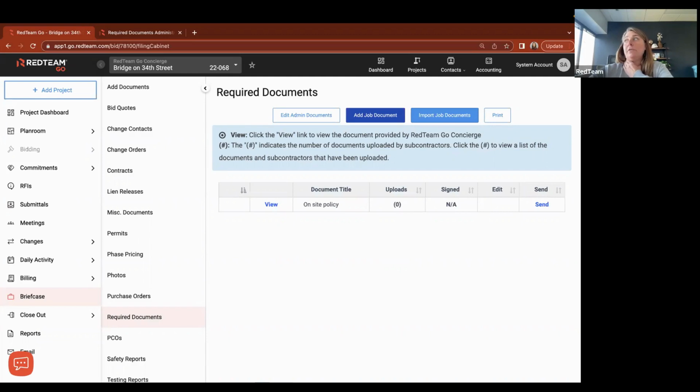Oh, Ben, you clarified for me. Thank you. So Ben was asking his question on work that's not contracted for, like service work without material like cleaning. So cleaning is still a subcontract agreement. So I would still go to commitments and contract out where it is a full service. They're going to be supplying all of their materials and the labor to do the cleaning. So it's still a subcontractor cost, even if it's just labor only. It's still a subcontract. Okay.